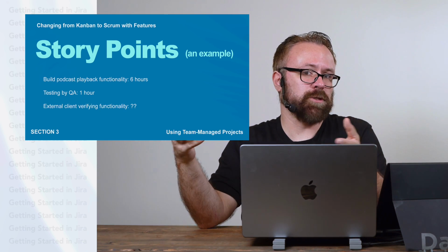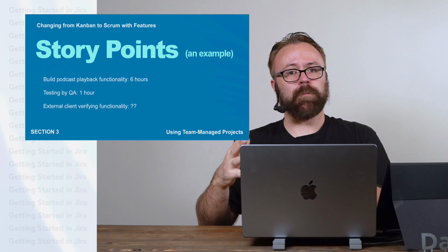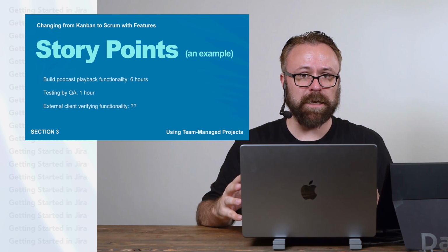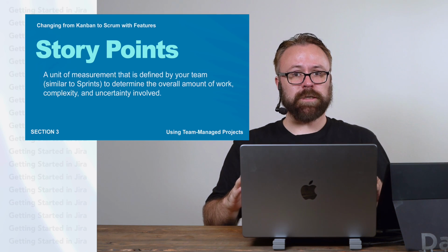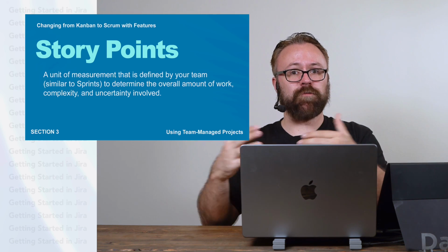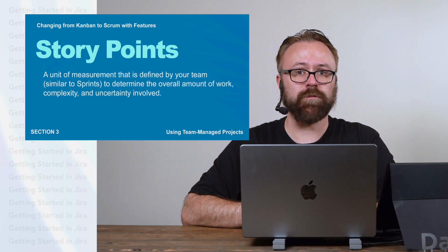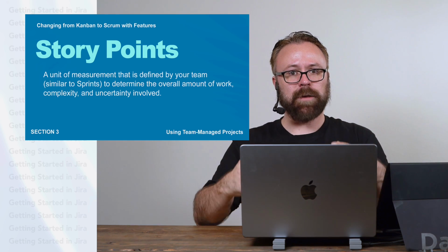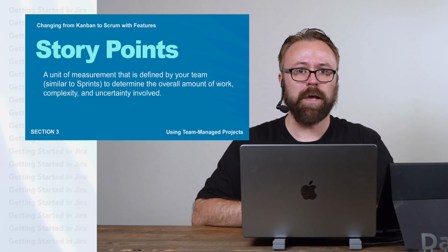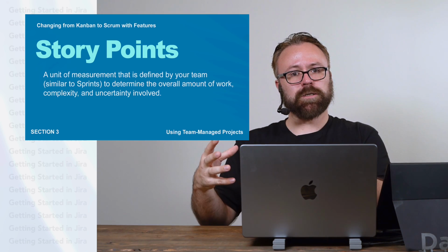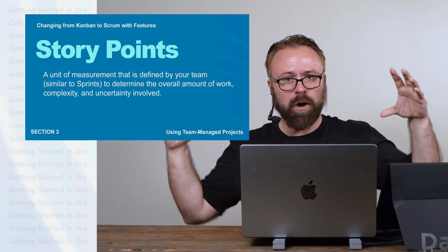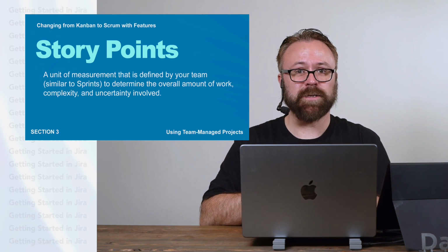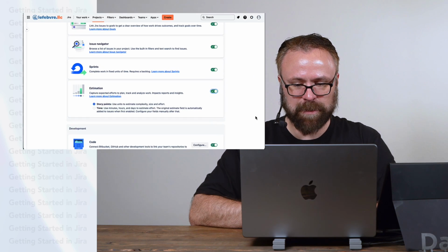It's almost impossible to calculate how much time they're going to take, but the story is starting to get a lot more complex than just the time to build the functionality. That level of uncertainty jumps higher than if it's something that you can just knock out by yourself in a few hours. So that's where story points come into play more than just the time itself for a single person to do it, because it can be a unit to help try and capture all of that into a single estimate. An estimate is the key word there because no one can predict the future exactly.